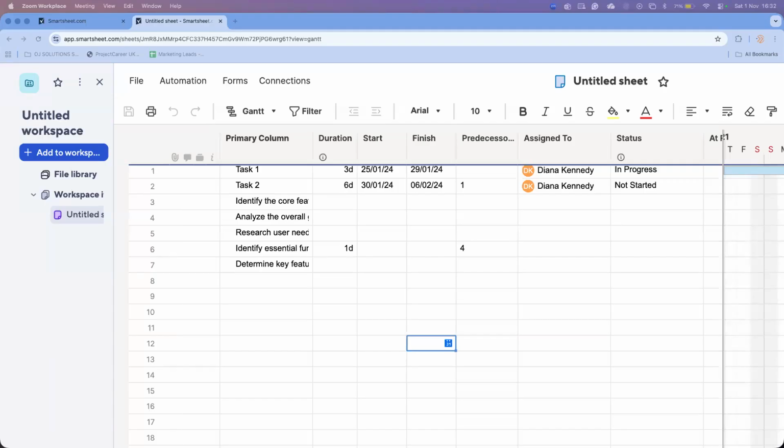With risk, it's usually 1 to 5, but in this case it's used at its own discretion. It would be 1 low, 3 medium, 5 high. With the risk, what we're considering is the impact and the probability. So we will say impact times probability equals severity.